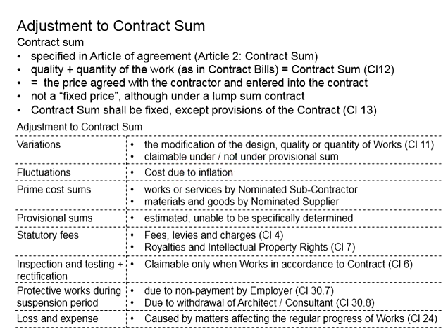The employer has the right not to entertain the request for adjustments of the contract sum due to inflation. But you know that under some circumstances, when the fluctuation is ridiculously high, this may lead to consequences that the contractor cannot complete the work. At the end of the day, both sides will lose. Therefore, it will be up to the wisdom of the employer and the contractor to negotiate the degree of adjustment as a result of the fluctuations.